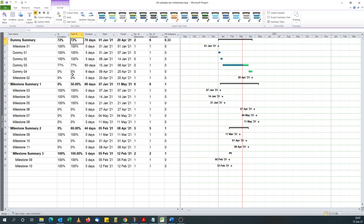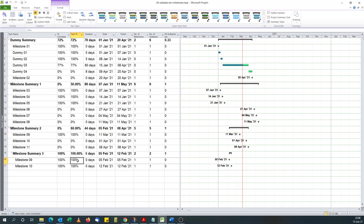Now if you notice, for this dummy summary task the default percent complete is 72, and our newly calculated percent complete is 72% too. But for milestone summary, the default from Microsoft Project was zero - our custom field is now showing 50%, which shows that three out of the six milestones have been completed. And for milestone summary three it shows 100% - all are completed. But for milestone summary two, where the default percent complete field shows zero, our new custom field shows 60%. That's because it's saying three out of the five milestones here have been completed, so it's taking this nested summary into account. Three out of five equals 60%, and that's it.